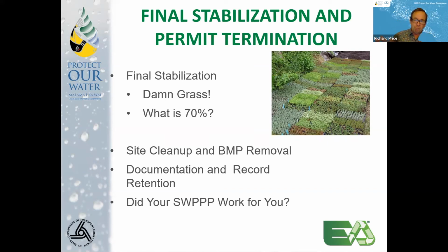Because as I'm sure you've all seen before, after you seed and mat and plan out and think you finish your project, and then the grass doesn't grow, going back and trying to re-scarify the soil and reseed and get it all back into shape, maybe repair some erosion that's happened, can be a huge cost. So taking the time to grow the grass right can save you a lot of trouble in the end. And then finally is the site cleanup and BMP removal once you have the grass.